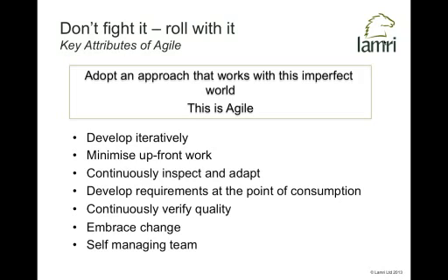We'll minimize the amount of upfront work, because people find that really hard to get their heads around. And we'll incrementally and iteratively do the work of the project in a series of mini waterfalls, if you like. We'll continuously inspect, continuously test what we do, and we'll adapt and change as we go. As we realize we can work smarter, we'll incorporate working smarter. And working in iterations gives us a wonderful framework to build in this inspect and adapt cycle.